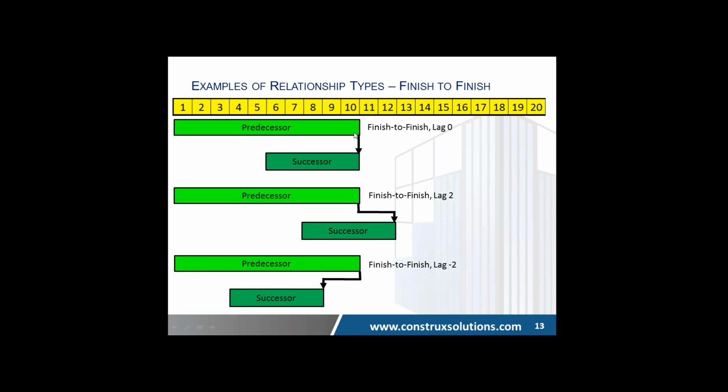You might even put paint and drywall in that category. Paint can easily catch up to drywall if you want to get them done on the same day. A lot of times you see these types of ties towards the end of a job when people are really scrambling to get things done.